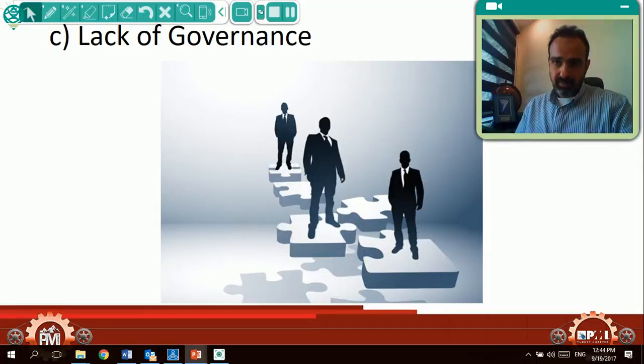So for the governance needed, first of all, the PMO needs a sponsoring body to support it, preferably not just one person. It has to be a committee, preferably from across the organization, so that the PMO gets the support needed regardless of the department it needs support from, to ensure alignment of the whole organization with the PMO.